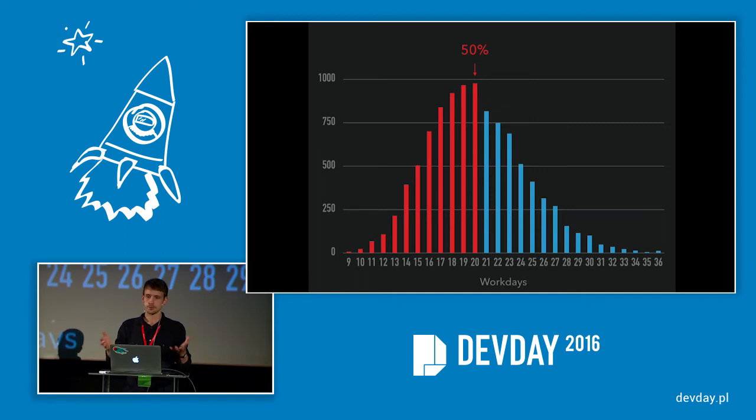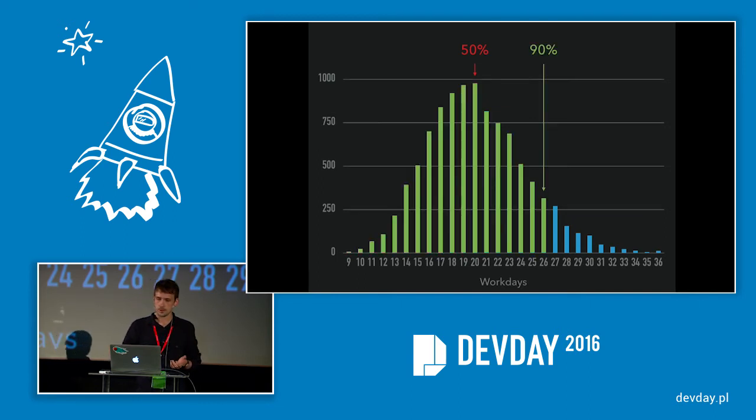But what if that's too risky? Well, we can take the 90th percentile as well. So 9 times out of 10, Jarek is going to be faster than this day, which is 26 days. So we have here a range of 20 to 26, which allows Jarek to go back to his client and have a much different discussion based on statistics and data, and say, look, I might deliver between 20 and 26, and these are the probabilities.